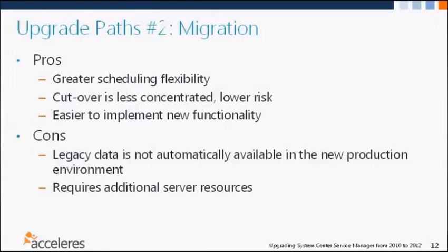And the second is, of course, it requires additional server resources. At least twice as many servers because you're duplicating a production environment, and usually more because we like having development environments and lab environments to test things out before we move them into production. So it can be quite a lot more in terms of infrastructure resources.